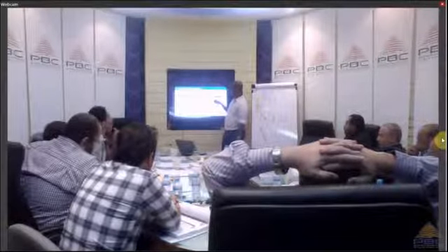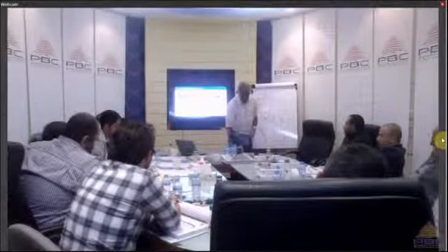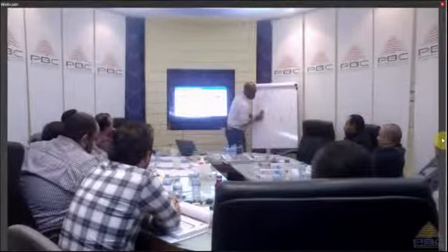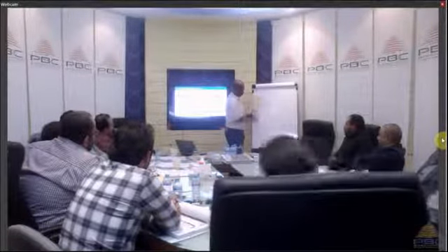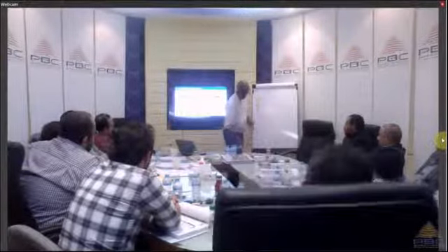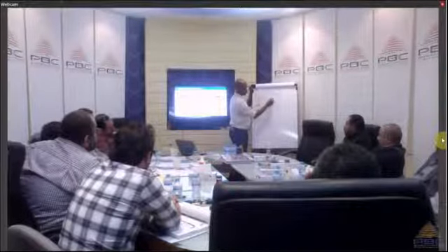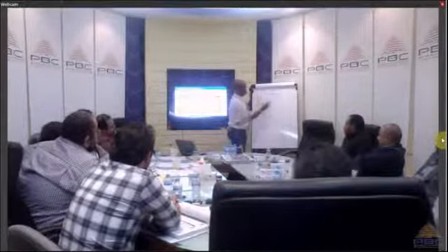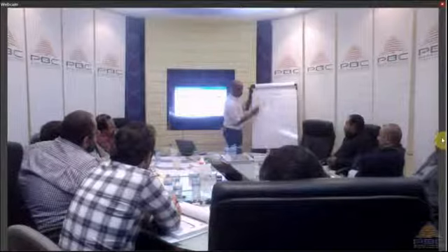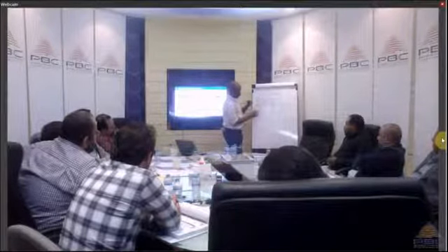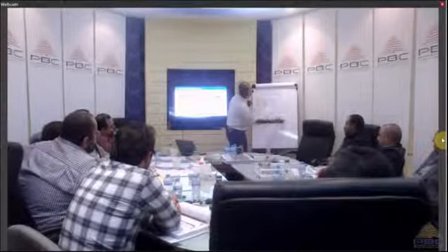You can also create something called a resource breakdown structure. The resource breakdown structure is similar to the WBS, but it has to do with your project resources. It looks like this. So in my project, the Aziz project, for example, I have HR, equipment, material. Under HR, I have consultant, labor, contractor, engineer, and so on.